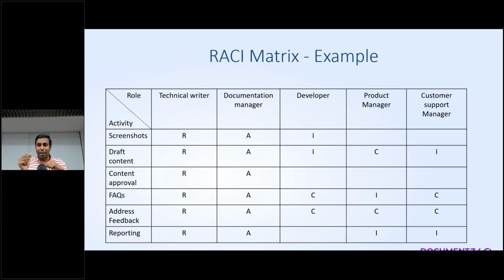And let me give you a quick example. If you look at reporting, the documentation manager is the one who is accountable for reporting, so they should drive that activity. Who is actually doing the work? It's technical writers. By the way, who needs to be informed about these reports? It's product managers and the customer support. Okay, so it's very crucial.